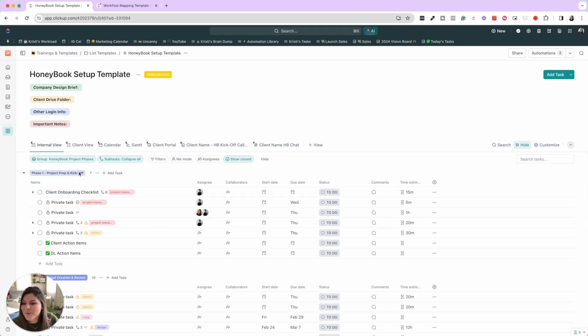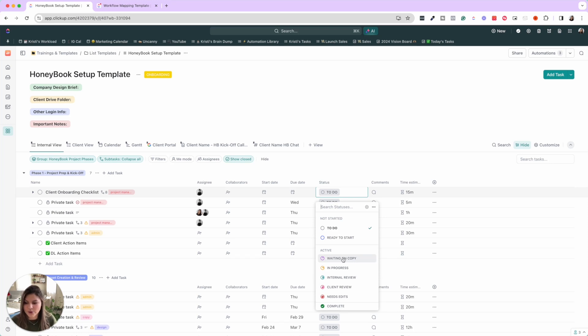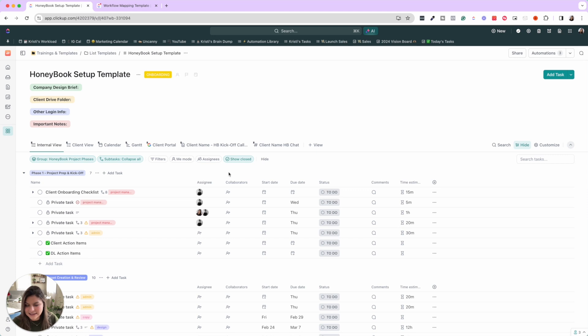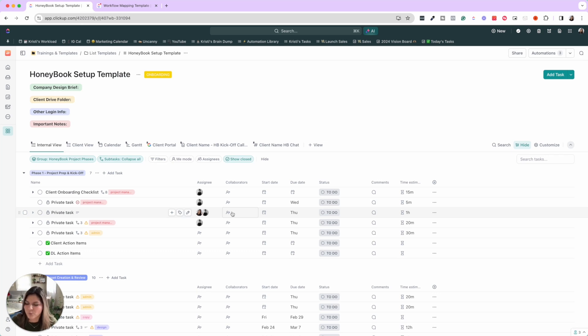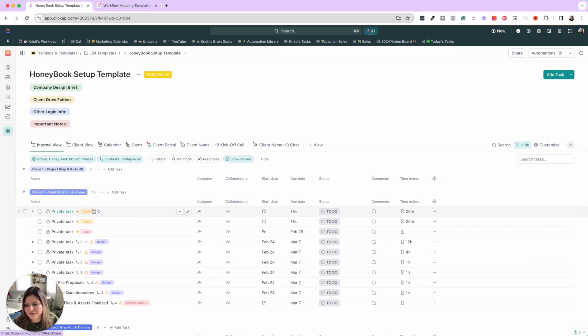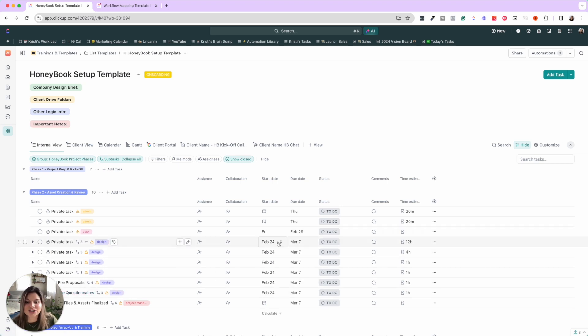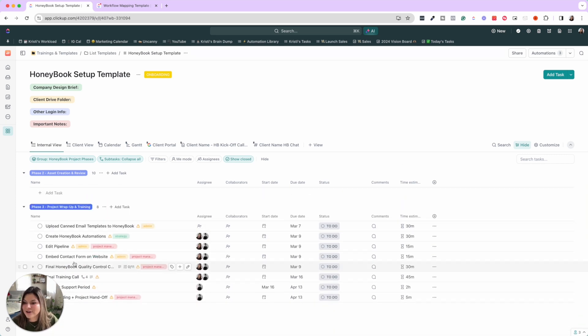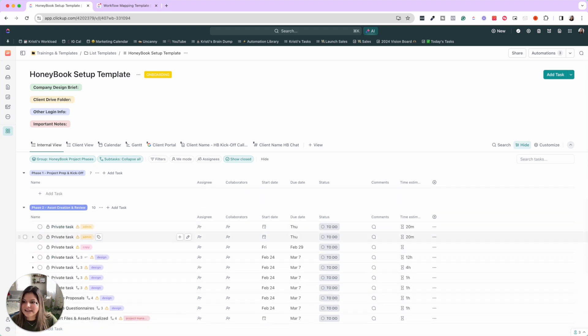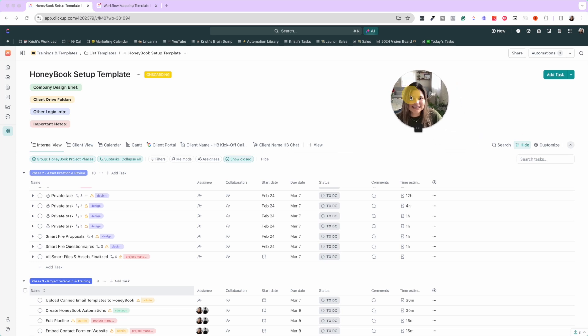So we have project prep and kickoff. The different statuses are ready to start, waiting on copy, because sometimes there are elements that we're waiting on copy for and we want to know that our designers can't start this yet, in progress, internal review, client review, needs edits, and completed. We have a signee and then we have collaborators to know, okay, our designer Nina might be working on this, but then our PM and our other designer is collaborating with her. So you'll see the project prep and kickoff, the asset creation and review. So this is all of the assets that we have to create and the start and due date of when we want that first draft by, then the wrap up and training. So this is project prep and kickoff. Then here are all the things that have to happen in the middle of the project. And then here is the wrap up and training.